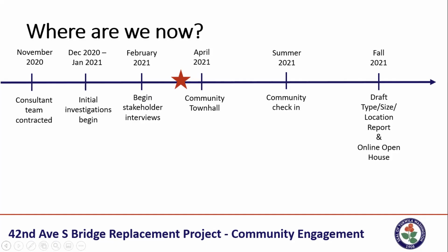The type, size, and location report has a great part of that being the community input, because the cream of the crop of the community input will go into that report, and that is due by the end of the year, as Hari mentioned. Thank you.